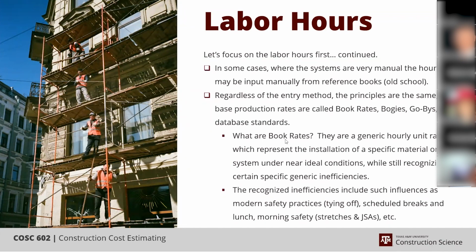And so a lot of companies in the Baton Rouge, Louisiana area have databases that sit on top of Logie Nost, while nationwide you have a lot of companies sitting on top of Page and Nations. But again, the problem is that a lot of that data reflects studies and productivities that were known in the 1970s. In a lot of cases, the method of installation hasn't changed significantly, but it has changed.